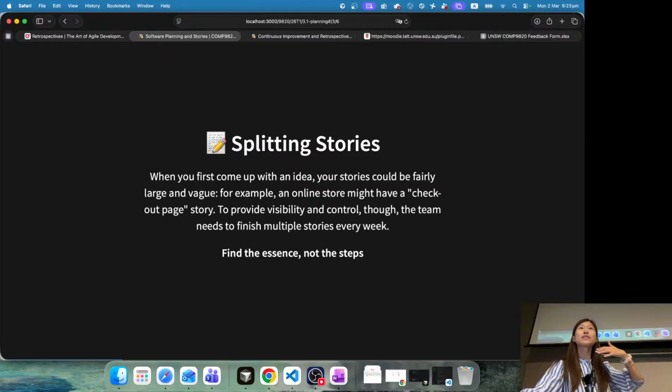So when the stories are too big, they are too general, and it's hard to prioritize which part of that big story is more important, and what is the specific value that we are actually bringing to the customers. So sometimes we need to split the stories.